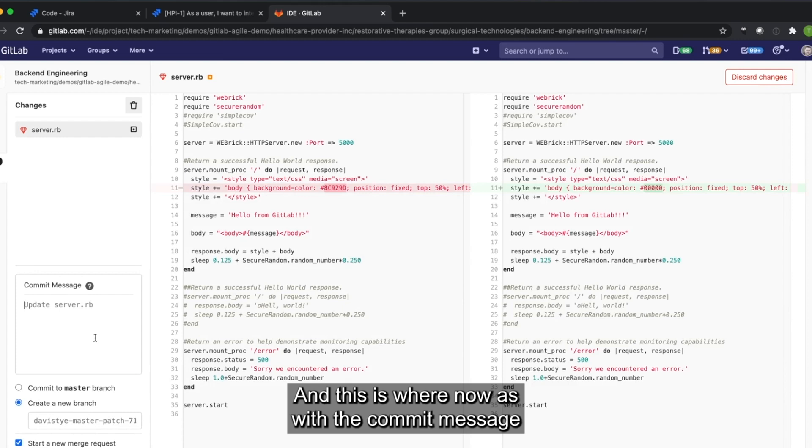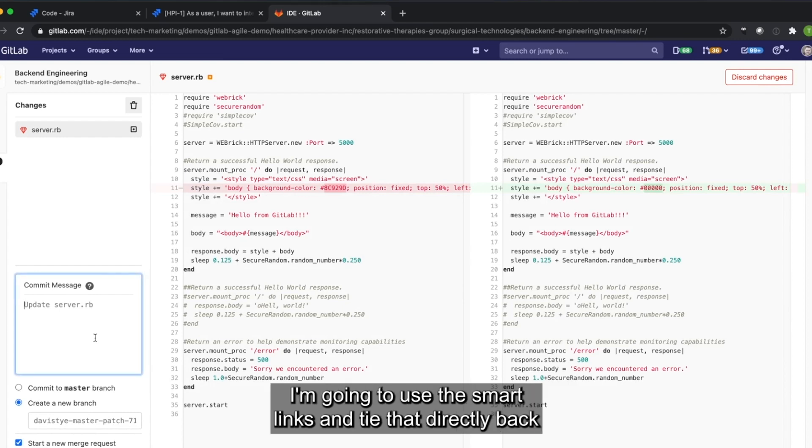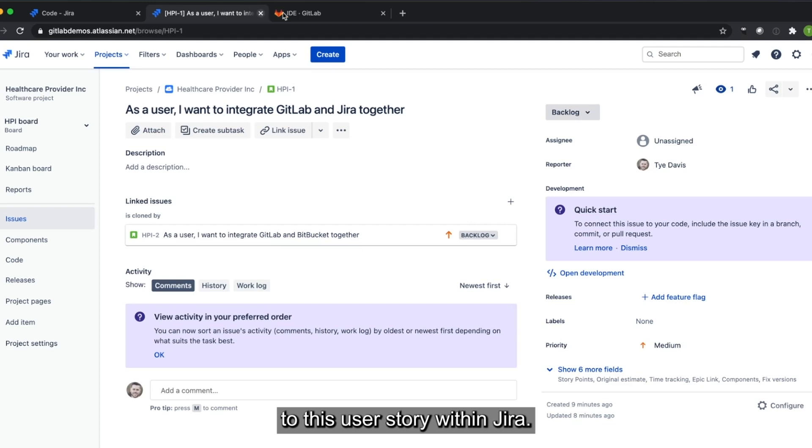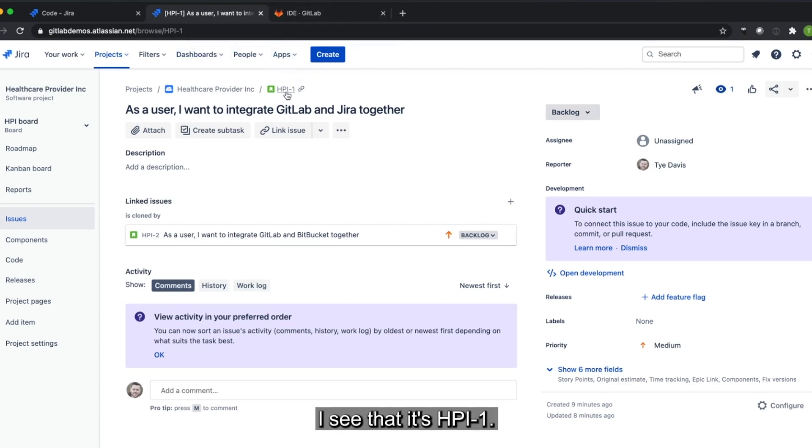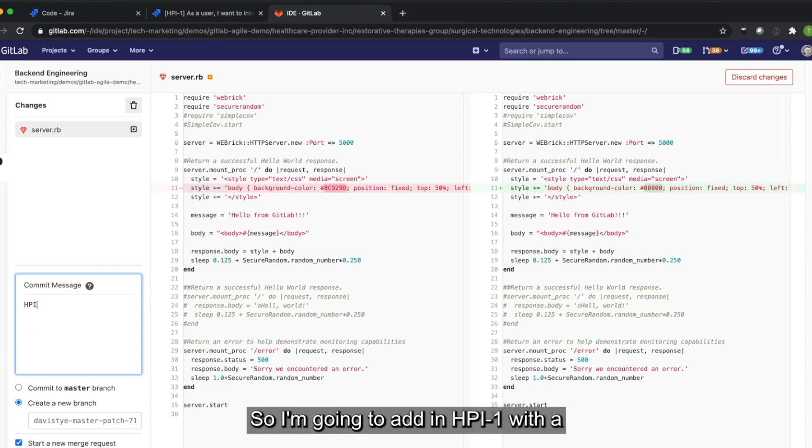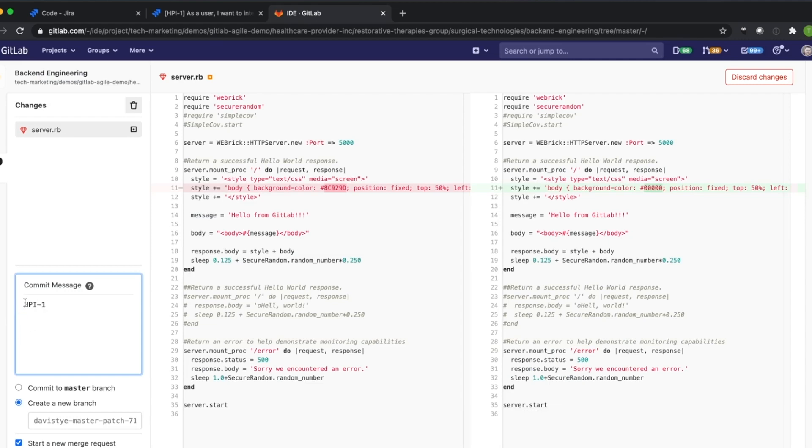And this is where now, with a commit message, I'm going to use the smart links and tie that directly back to this user story within Jira. I see that it's HPI-1. So I'm going to add in HPI-1 with a pound sign in front of it.